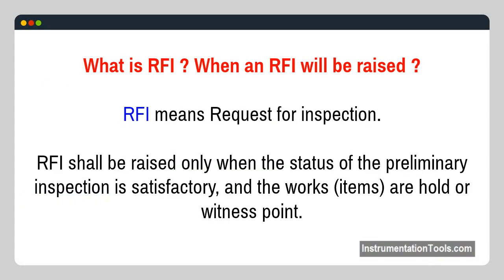What is an RFI and when will it be raised? RFI means request for inspection. An RFI shall be raised only when the status of the preliminary inspection is satisfactory and the works or items are at a hold or witness point.